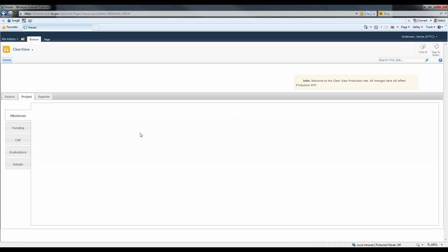It's still trying. The next tab is the Funding tab. The Funding tab is used to view project funding status and to update current cost estimates. So if your project recently held a PL&G or a joint inspection meeting, this means that your estimates need to be updated, and this is the screen that you will use for these updates.